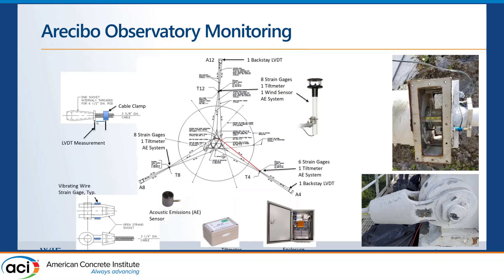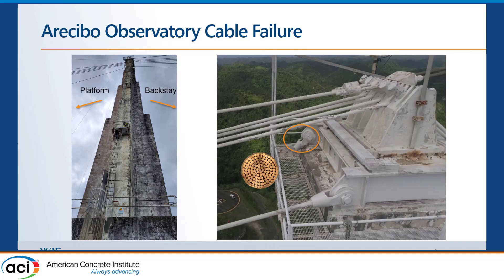Unfortunately, we couldn't install the acoustic emission system. Acoustic emission equipment has long lead times since it's produced by only about three manufacturers worldwide for structural applications. We were working with a manufacturer from Germany who produced the system for us in three weeks, and we received it in the US. But once we received it, another cable failure appeared, and at that point the structure was unsafe to work on — you'd need to climb about 400 feet to reach the platform at the top of each tower. After another 10 days, another cable failure appeared, and the whole structure came down.